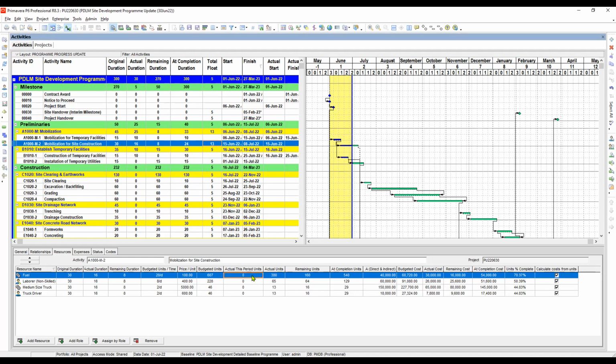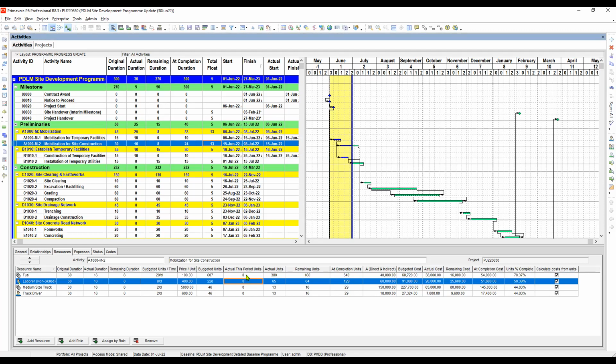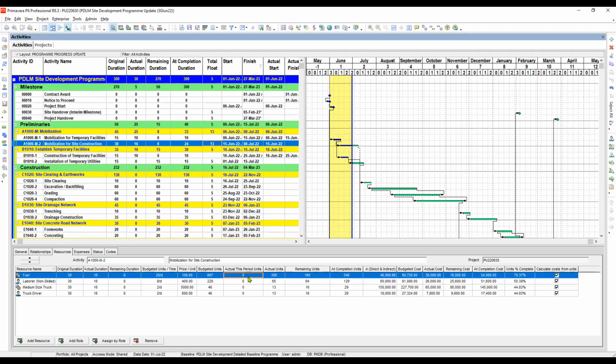For now, this is the cumulative amount, but for the next update, if you input data in here, it will be added. The previous cumulative or previous period will be added automatically with the value that you will input here. So let's say we will add 50, then if you can see here, it will become 320, 430. Okay, I hope everybody understands it.